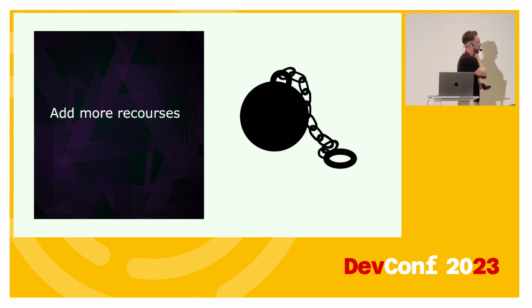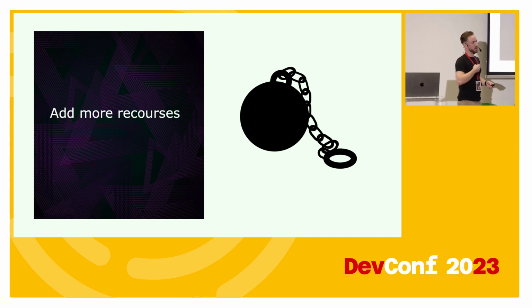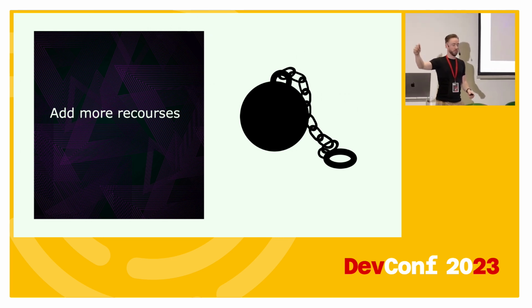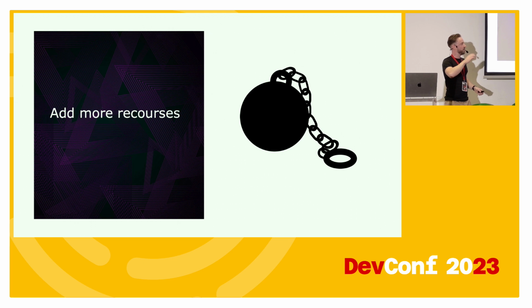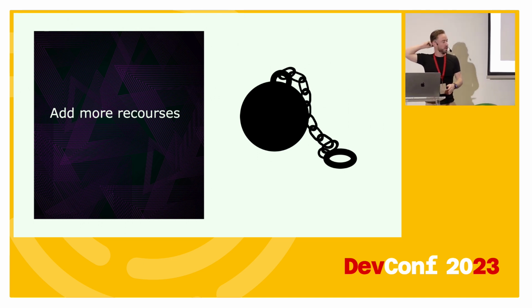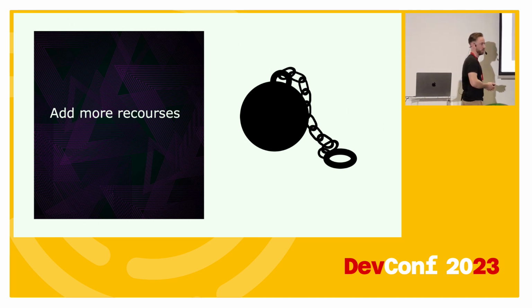And that ball and chain will grow and grow and grow. At some point you see that teams, and I've seen this in Jira reports, I don't know if you look at annual reports of your team sometimes. You can see the amount of velocity that you have performed. And you see sometimes teams, when it goes down slightly but slowly. In January you took on 50 points, and by December you had a very successful sprint. You would call a sprint very successful if you only performed for 40 points, for example.